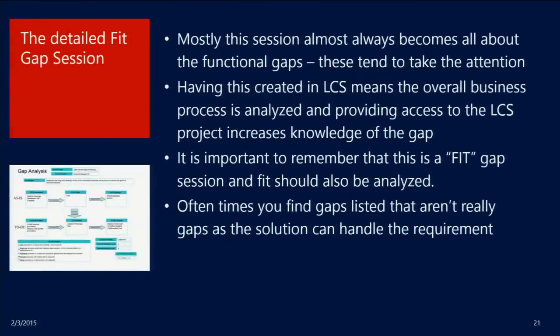All right. The detailed fit gap. When I'm reviewing the detailed fit gap at a customer site, oftentimes what I'll find is particular areas have some major attention, whereas other areas tend to be light on. So going into that particular discussion, I notice that everybody typically tends to focus more on the gap list than they do the fit list. It's important to understand the end-to-end process, and I'll tell you why. It's because 9 times out of 10 when we do the fit gap analysis, we find they're missing sometimes as much as 30% of the core functionality in that fit gap review.